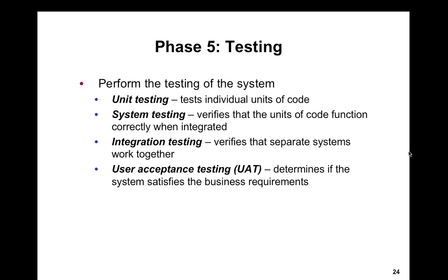So the testing itself is broken out into a lot of different stages. We have unit testing, system testing, integration testing, and user acceptance testing. Right there in the development, in the beginning, we can do the unit testing while the development's happening. It is basically testing each unit, each module, each object, each procedure, making sure that they're functioning. The system testing takes all of the smaller units and puts them together to create a bigger test environment. And we're really looking at the whole of the parts.